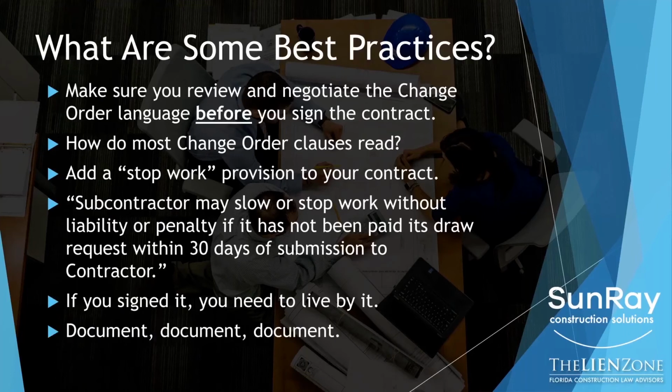It's critical that you document everything that's happening on the job. If people are slowing you down, maybe you're the drywall contractor, or let's say you're the electrician and you can't do your rough-in because the framing and drywall isn't done. What evidence do you have of that? Are you making comments at the weekly meetings that are being notated in the meeting minutes?